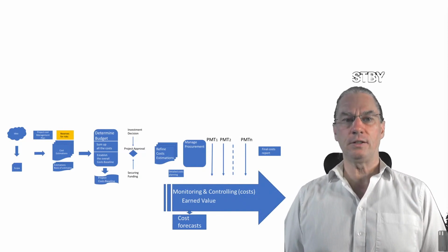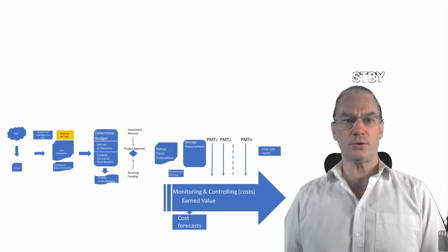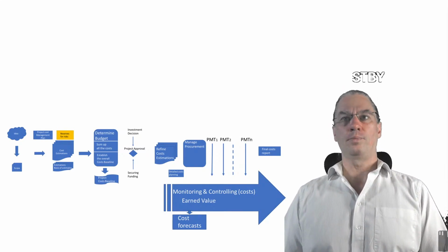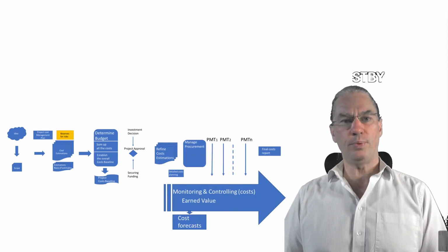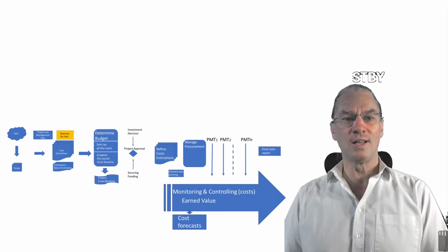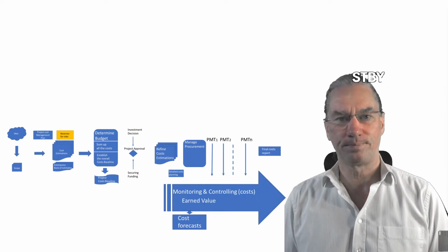Accounting departments don't like to suddenly receive a lot of bills and be told they have to pay within 30 days. They want to know in advance, to forecast and prepare their cash flow needs to respect the deadlines in your project.